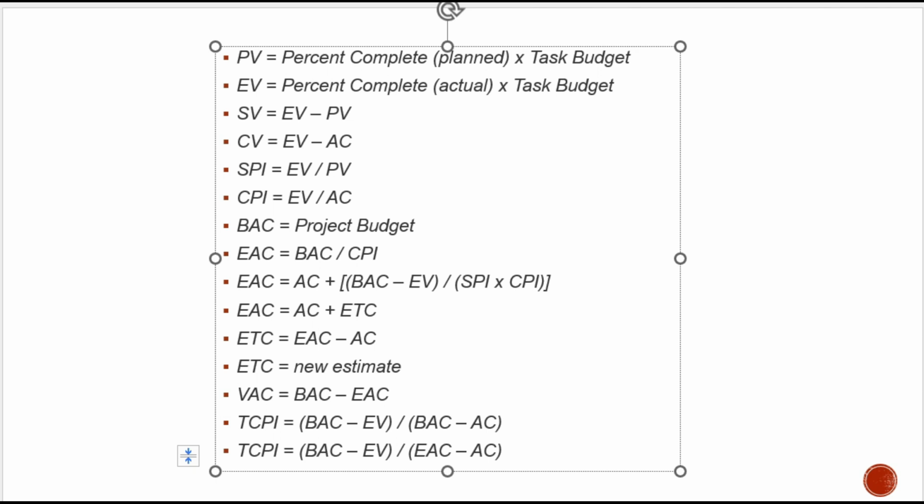go like this. What about the variance at completion? The variance at completion is just the difference between the project budget and the estimated cost at completion. That is the difference between 6 lakhs and 6 lakhs 74,000 rupees. So it is 74,157. That is a negative value, which means the project is overrun. That means we have a projected overrun of 74,157 rupees. The advantages of having an earned value analysis is that we can have an early warning system.